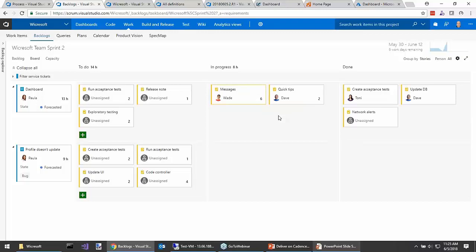We learn new things, we learn dependencies, we uncover technical debt, we uncover some really bad code that we need to spend some time fixing, so these estimates can go up. But as a Scrum development team, we want to always be honest in this, and a working agreement is to keep these remaining work hours updated. Hey, if we find new work, we should have the openness and the courage here to actually increase that.